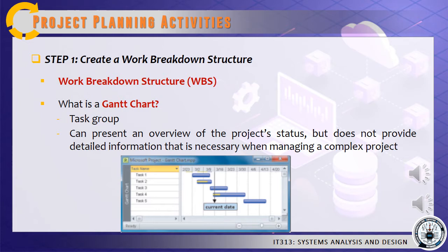A Gantt chart can show task status by adding a contrasting color to the horizontal bars. For example, a vertical arrow marks the current date as shown in the figure. With a fixed reference point, it is easy to see that Task 1 is way behind schedule.